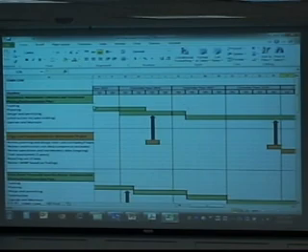So I'm going to go with the traditional treatment and collection, because I think it's very important to recognize exactly what Jeff said, which is there are uncertainties. And one of the uncertainties is, are the construction planning level cost estimates correct? So we've got estimates based on very preliminary levels. Then you've got design estimates, and at some point you want to make sure that your design estimates are in the same range of your other cost estimates.